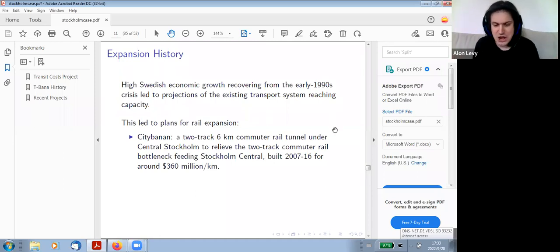So they've since built another 2-track tunnel, currently designed around 16 trains an hour with future expansion to 24. This is a 6-kilometer tunnel with 2 stations. Stockholm City, which is on level -3. Remember, I mentioned before that Tessentralen was built as 2 levels, one for the green and red, one for the blue. This is beneath both of them. It's a 4-track station. It's a large cavern because the commuter trains are bigger. This is why commuter rail in our database is consistently more expensive than normal metros.